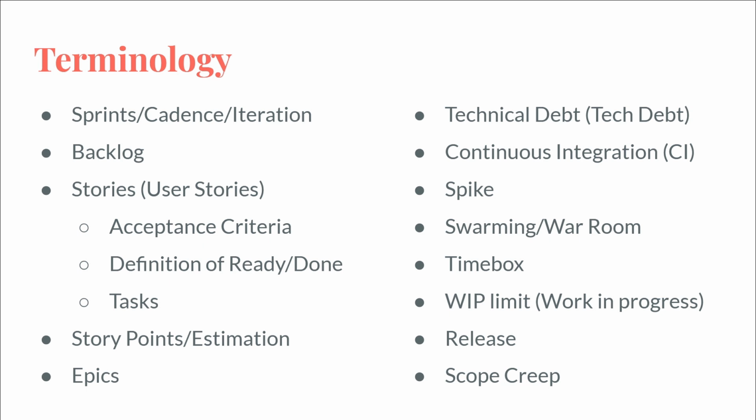Yeah, story points and estimation. So a story point is a way of estimating the complexity of a story or of a ticket. And most people want to try to map this to time, and that's something that everyone in the agile world will tell you: do not do that. That's not good. The idea here is, if you say, I will point this at 1 hour of work or 2 hours of work or 6 hours of work, that's not a really reliable way of working on it.